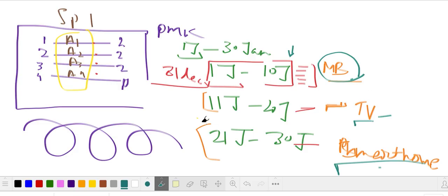As time passes, when I come to 11 Jan, then I'm going to talk in detail about that sprint, and when I go into the next sprint, only then I'm going to talk about that sprint in more detail. So this is what rolling wave planning is. It's like you're rolling with the wave.